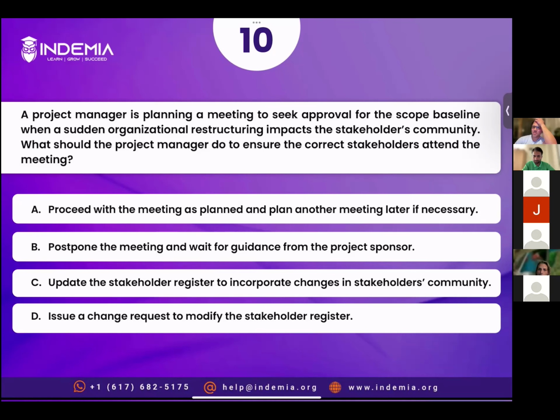Yeah, Amar, because proceeding with the meeting without the stakeholders, as you said, as planned, and planning another meeting is not going to help. And postponing the meeting and waiting for guidance from the project sponsor means as a project manager, you're just depending on someone and not taking actions and decisions on your own. And issue a change request to modify the stakeholder register.